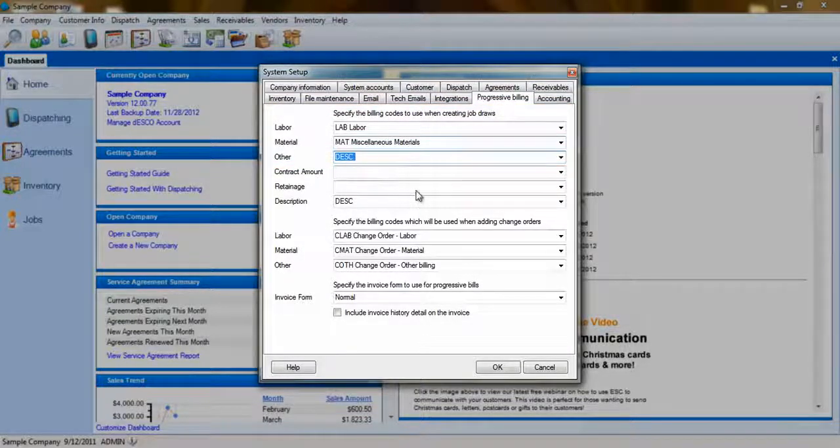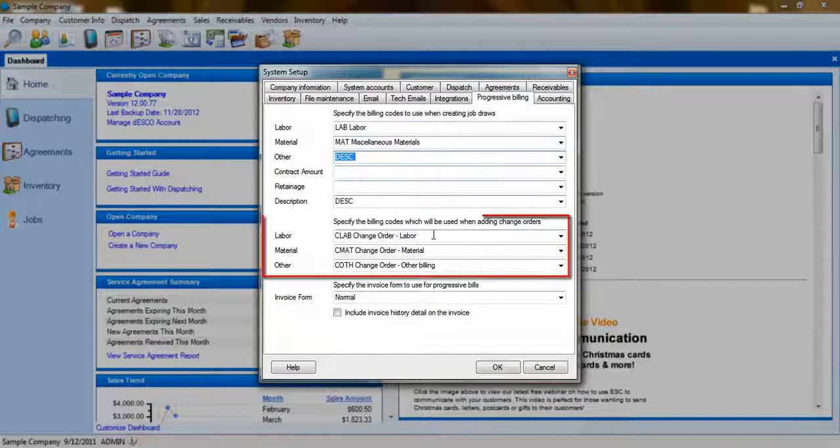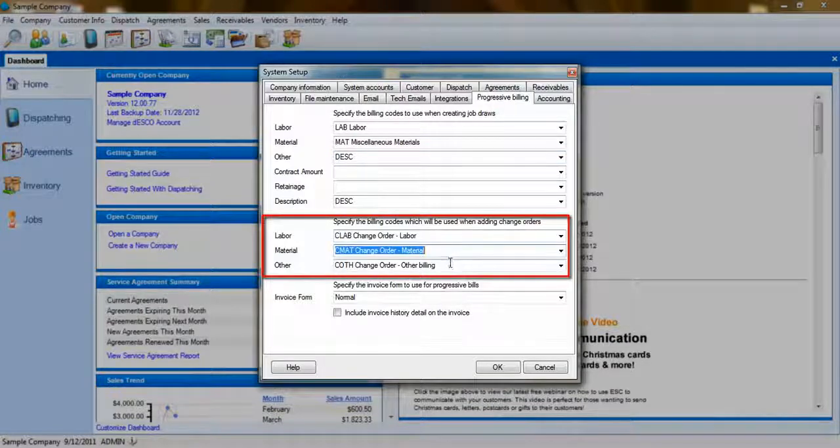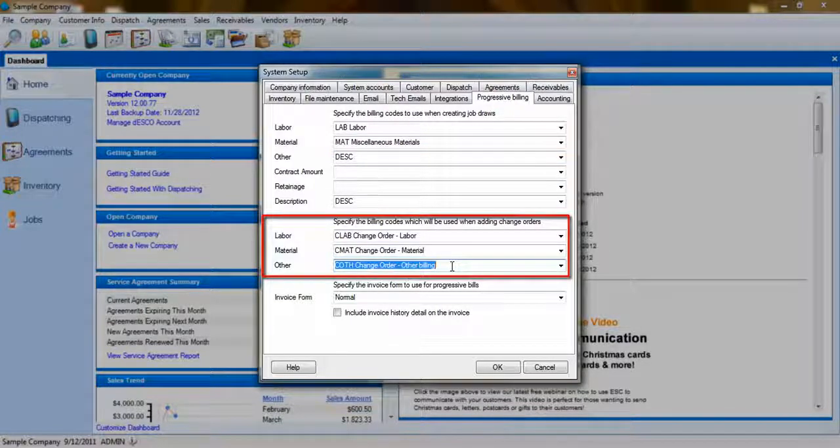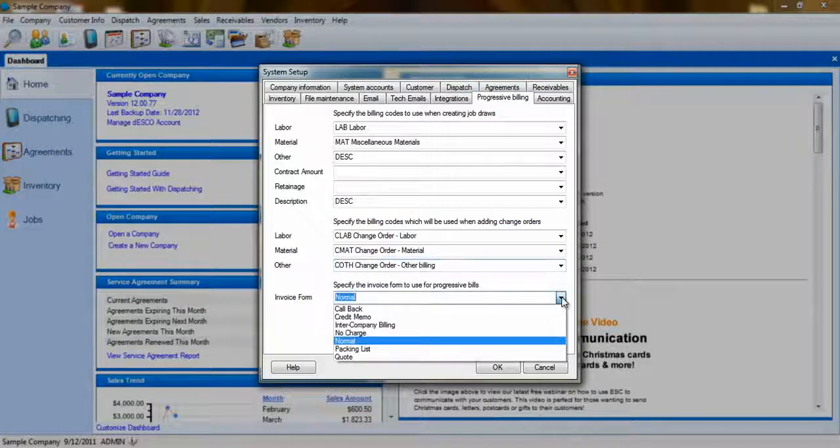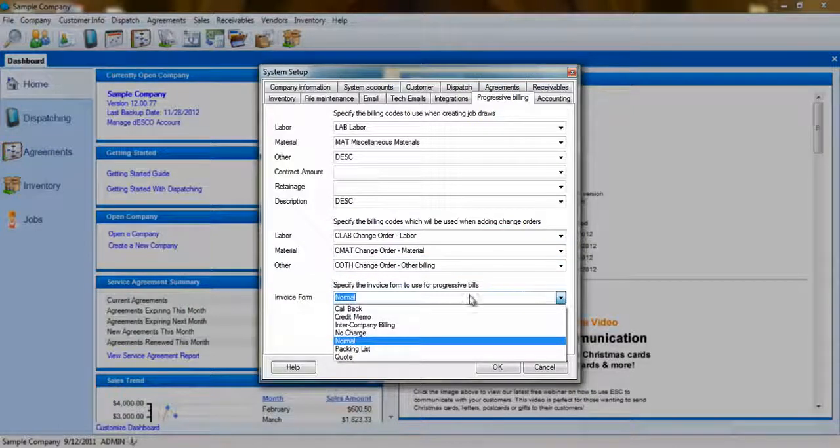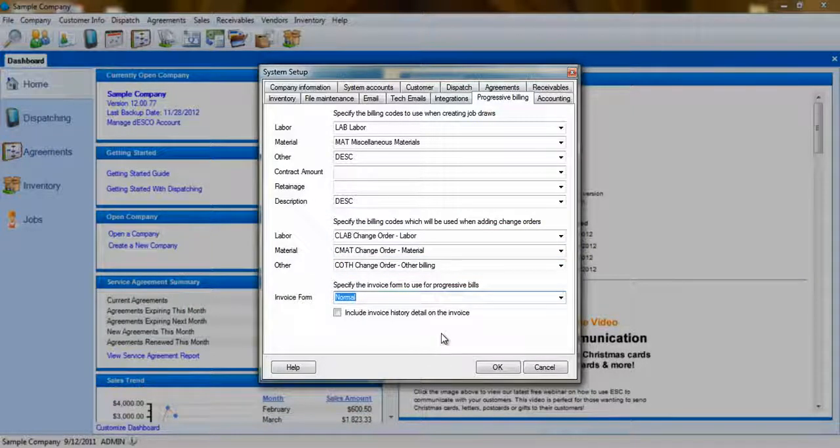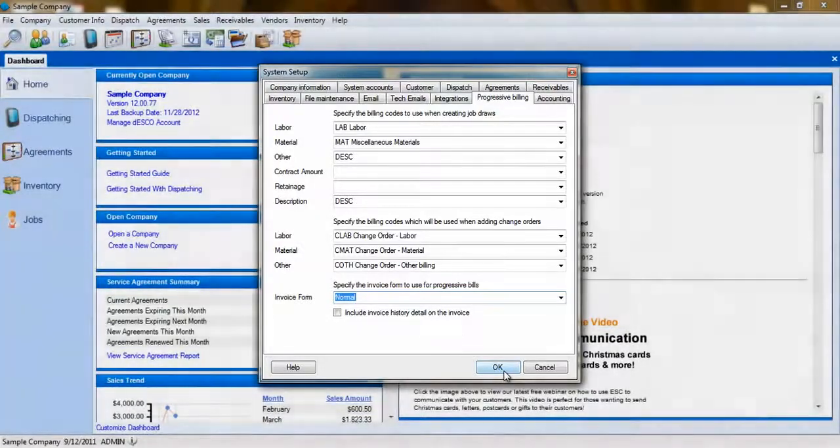You'll also have the ability to assign billing codes for change order items, so that you can separate these on the invoice. You'll also have the ability to assign a default invoice specifically for these Progressive bills. Once you've made your selections, click OK.